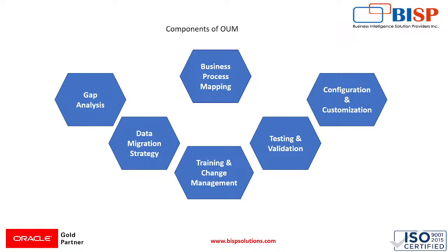Okay, so now the other is training and change management. We have to ensure that we provide end users well trained for a smooth transition, because after migrating or integrating the system, the end user has to work on the system. If the end user is not properly trained, it will be very difficult to give support all the time, because it will take a lot of time, and this means that the project is not going well.